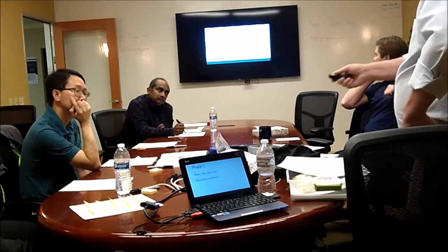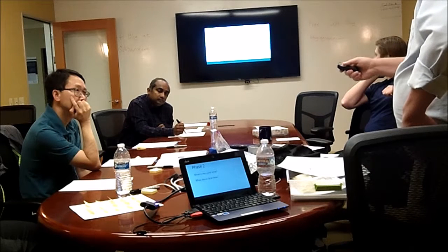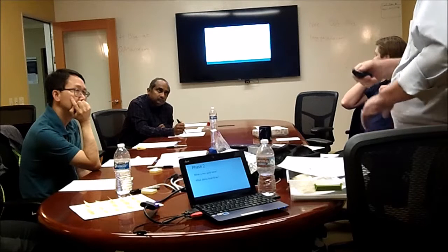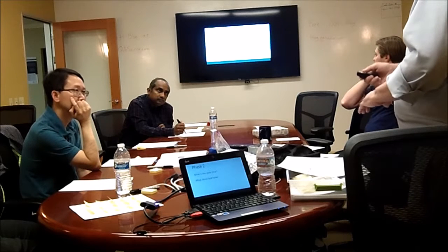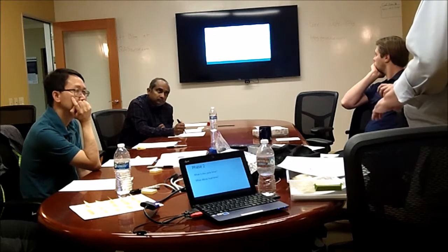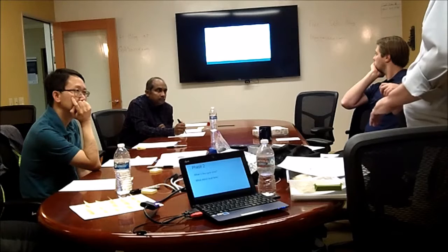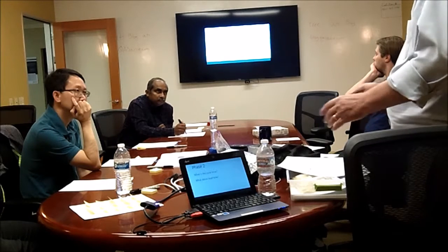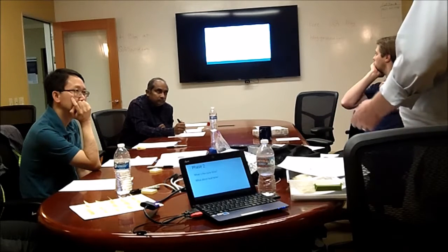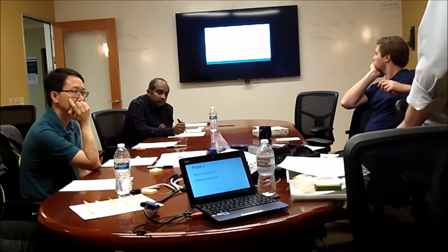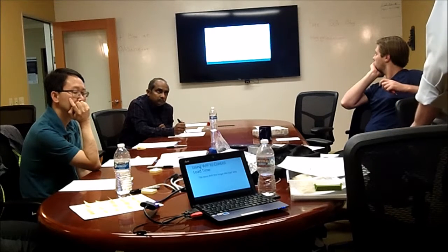You get a pile-up coming here, and you put something in the system here. Some things make it through, and some things take longer. For each successive unit, it's going to take longer for it to get through. And if that becomes greater than the rate at which you can clear them, then you have the situation we were just talking about.